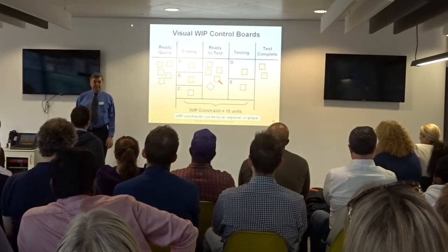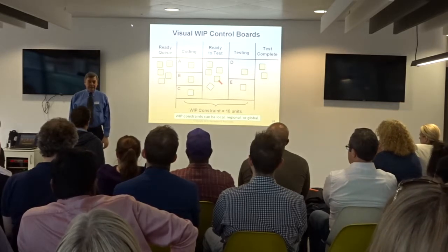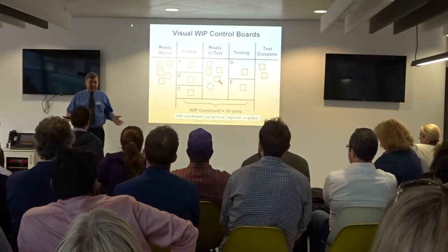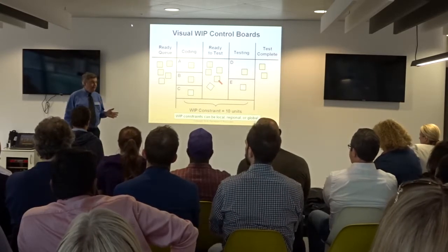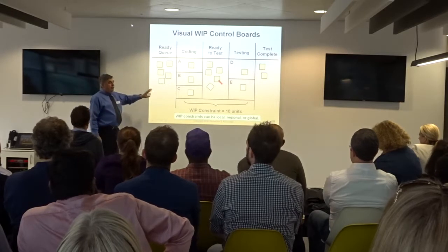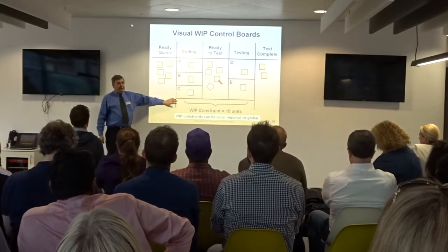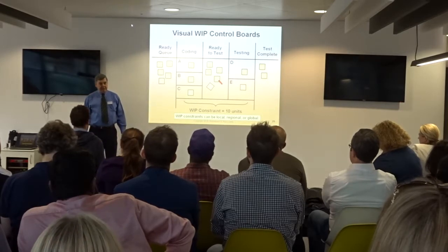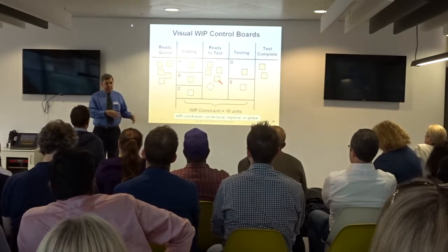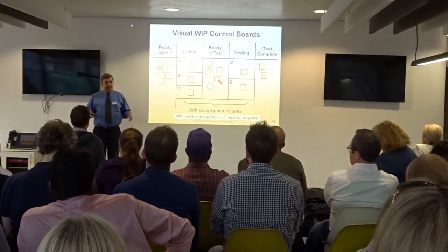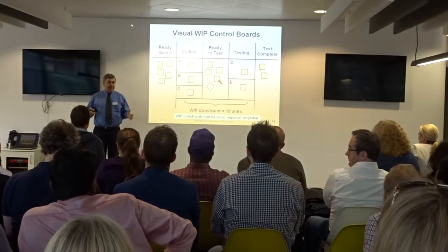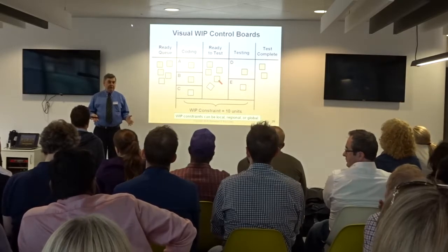It is not time. It's state. It's the state the work is in. And that changes everything. Because if I know what state occupancy is, then I know where the queue is. And the queue is the majority source of cycle time. So if I'm updating this board at a daily stand-up meeting, this is the first time we have ever had a real-time sense of where the queue is in our development process.